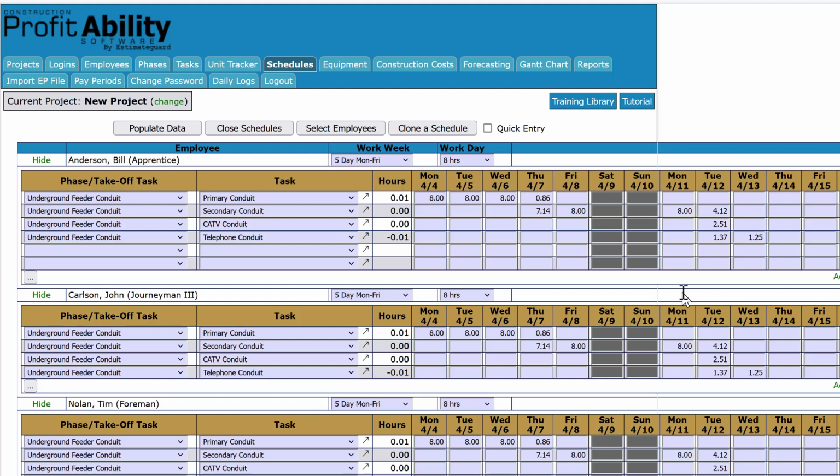Now, this is where we're kind of crossing the threshold. Up until the point of completing that master schedule, that's my job as a project manager, to put all of this together, get the data imported, build the schedule, and then hand this off to a field manager. I prefer for my field managers to write their own 2-week rolling schedules. So we cross the threshold between project manager and field manager here. Now the field manager is writing the schedules for his crew.